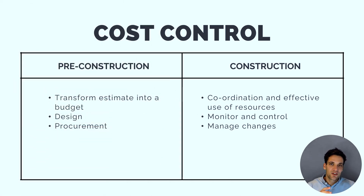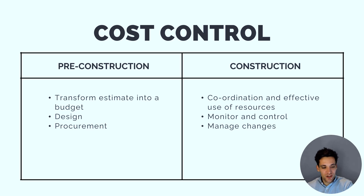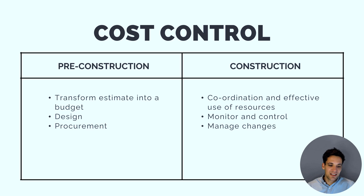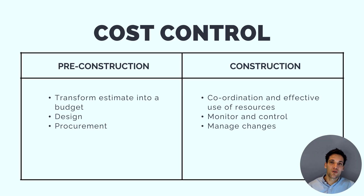Cost control can be broken down into two subsets: pre-construction cost control, which I like to think of as setting up the project for success, and construction cost control. Within pre-construction cost control, we take our estimate, turn it into a budget, and manage any design and procurement activities to ensure we're not overspending. Then we move into the construction phase where we spend the majority of our budget, effectively coordinate and use resources, monitor and control spending versus work completed, and manage change.